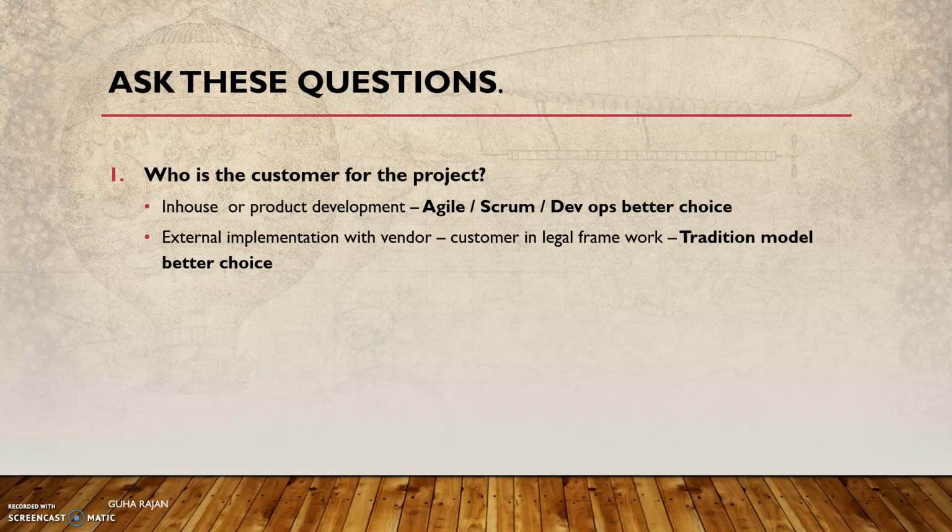The customer needs to provide a solid scope, and based on the scope you then get into providing the code, and you follow all the documentation: functional requirements, technical requirements. All of this needs to be provided and documented, because if anything goes wrong, it all depends on the documentation you have provided. There is also an appropriate change management board whenever requests change, because that also needs to be costed. So in that case, yes, the traditional model will work better.